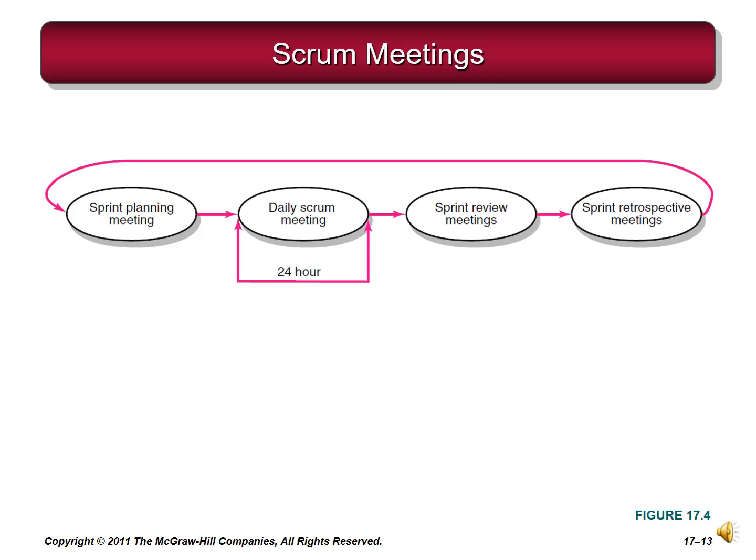The sprint retrospective meeting. The purpose of this meeting is to reflect on how well the previous sprint went and identify specific actions that can improve future sprints. The Scrum Master typically facilitates this meeting, and the team decides which changes will be made and how they will work together for the next sprint. The retrospective reflects Scrum's commitment to continuous improvement and the value it places on improving not only products, but the team's interactions.